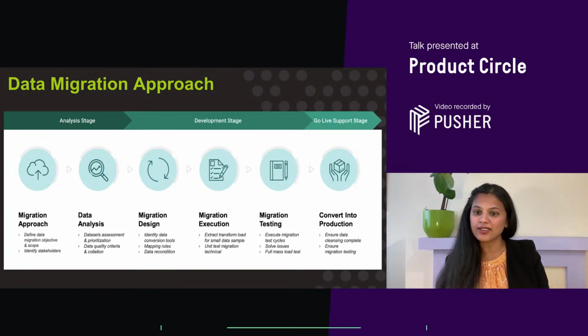The key challenge is not just building the solution, but having a proper test strategy to run both sanity tests with smaller data sets and volumetric data tests. This test strategy was executed by a combination of automation and manual spot tests.